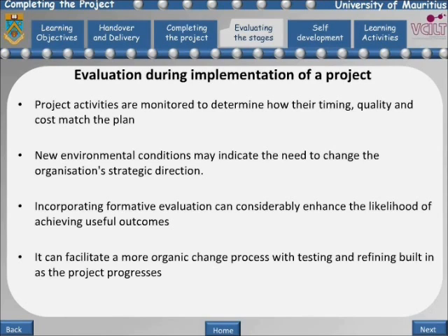However, formative evaluation can increase the complexity of a project because of the need to timetable an extra set of deadlines. It will also add new items to the risk log, particularly the risk of delays. If formative evaluation results in decisions to make significant changes to the project, it may lengthen the timescale, increase the budget, or necessitate additional quality measures.